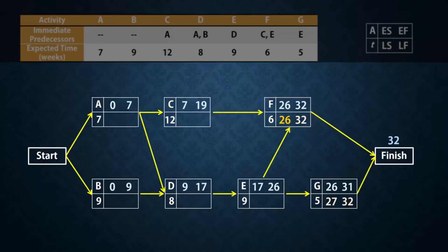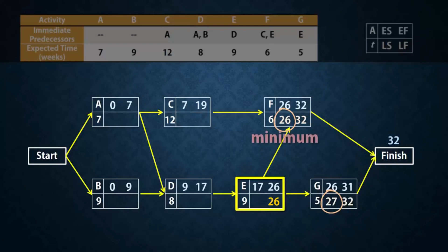E has two successors, F and G. The latest start times are 26 and 27 respectively. As a result, the latest time E has to finish has to be 26, in order for F to start. In essence, when doing the backward pass, the latest finish time of an activity must be the minimum of the latest start times of its successors. Thus, the latest start time for E will be 26 minus 9, which gives 17.